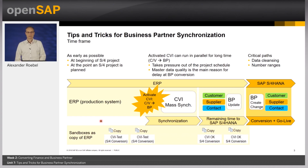We are often asked how much time is required to execute the business partner synchronization. Well, there is no fixed answer to this question. We recommend starting as early as possible once you have decided to go for an S4HANA conversion. We always try to prevent having the CVI topic on the critical path for your S4HANA project, because the CVI project has the potential to extend the timeline. There could be several reasons for this — for example, data quality issues that are only detected during project runtime.